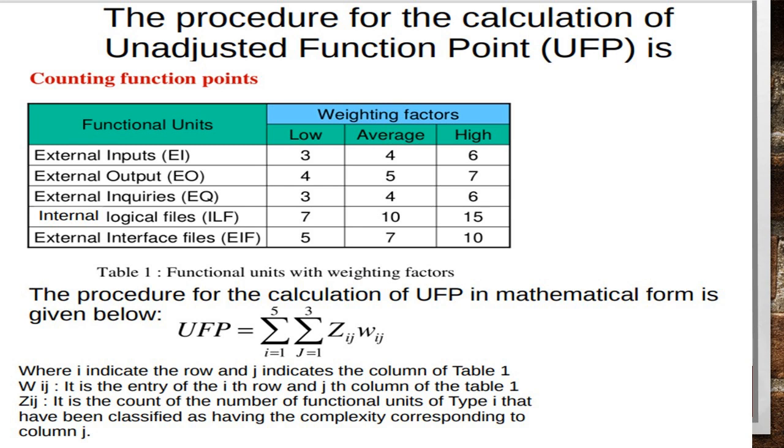Instead of just counting the function points, for these different functional units, we are assigning some weighting factors. The 3 possible weighting factors we have assigned are low, average, and high.